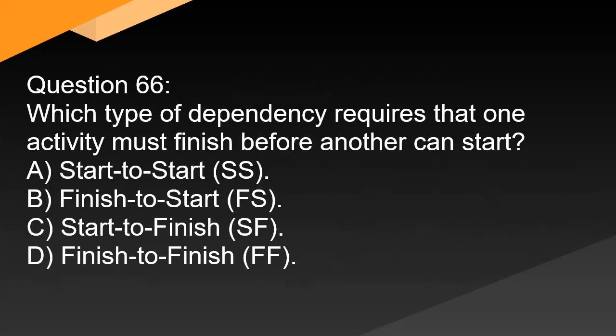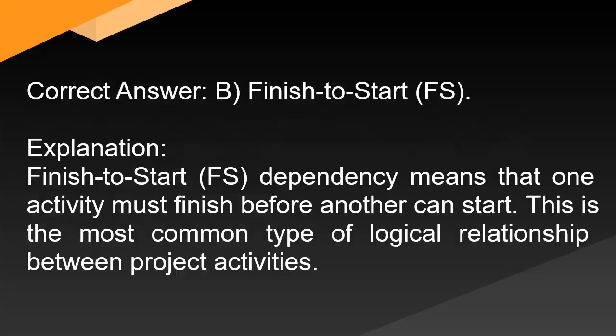Question 66: Which type of dependency requires that one activity must finish before another can start? A. Start to start (SS). B. Finish to start (FS). C. Start to finish (SF). D. Finish to finish (FF). Correct answer: B. Finish to start (FS). Explanation: Finish to start (FS) dependency means that one activity must finish before another can start. This is the most common type of logical relationship between project activities.